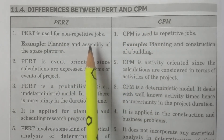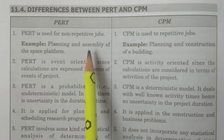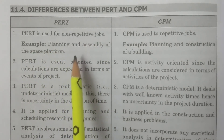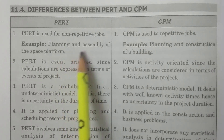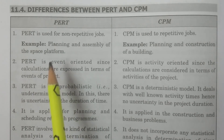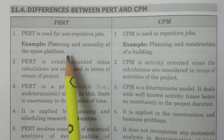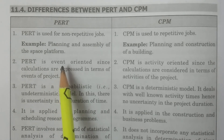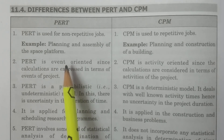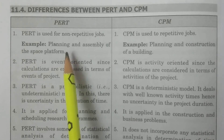I compare these two techniques and explain the differences. PERT is used for non-repetitive jobs — for example, planning and assembly of a space platform. The activities planned in space cannot be a repetitive process; they are not under repetitive jobs or activities. So that is where exactly PERT is going to be used.